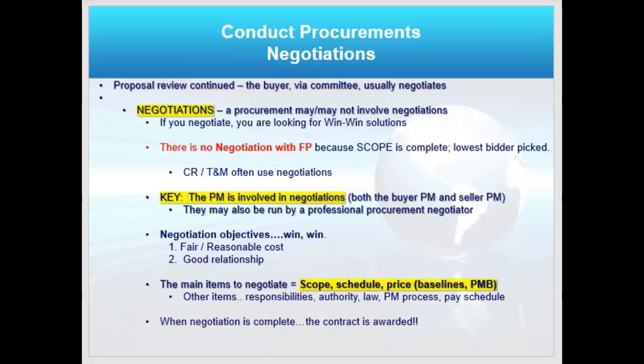Now, in this process, once I'd selected them, but before they were signed, negotiation would go on, right? And so, likely, especially for a cost reimbursable or time and material. I might do some negotiation with fixed price, but not likely. Because here's your detailed statement of work, your scope, and here's how much we're offering. So really there's not much to negotiate.